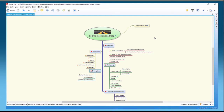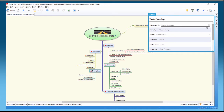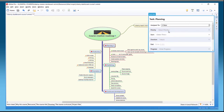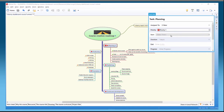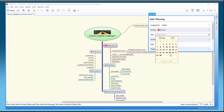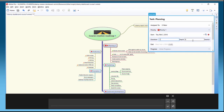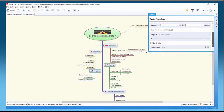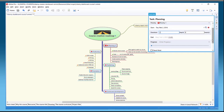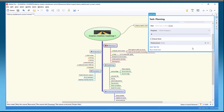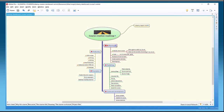Click on Planning and press Ctrl+Shift+T. We can enter an assignee — we've set some up already — so this job is going to be for Peter. We don't have to have assignees at all. Set it to priority one. For the start time, today is February and today's date is shown in orange. We'll start tomorrow, Tuesday, with a duration of three days for the planning. There are also fields for end dates, progress, and checkpoints.